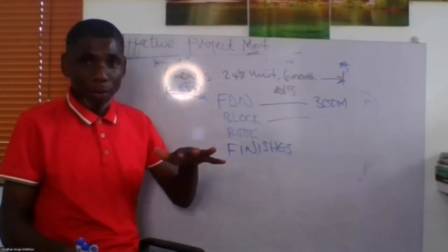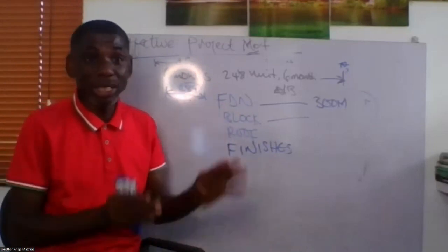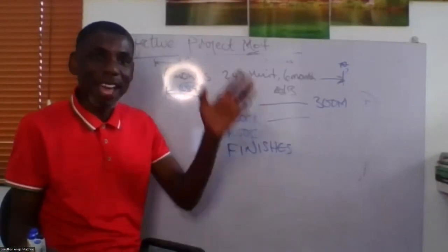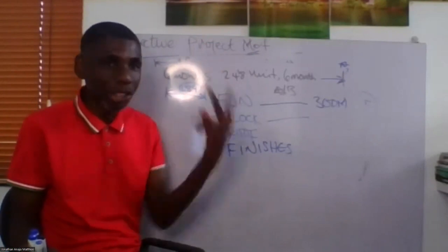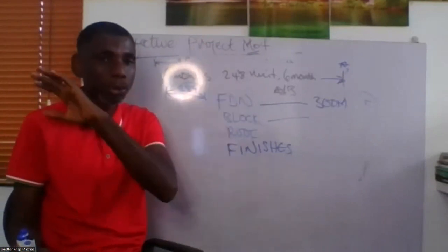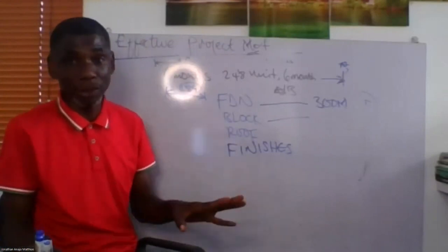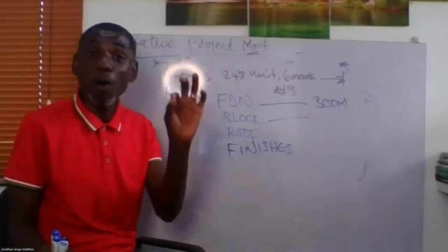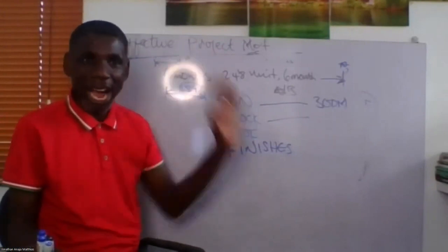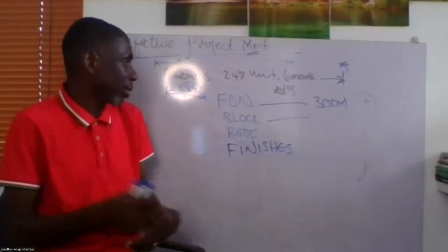For every project that I have, I have my closeout report. In the closeout report, I have every change that was made. I have the issues that were raised. I have every risk that we were able to mitigate. I have the failures and I have the success factors, right? And I have the number of artisans I used, the number of resources, the number of contractors for every project. I have it documented. This helps me to analogously estimate.